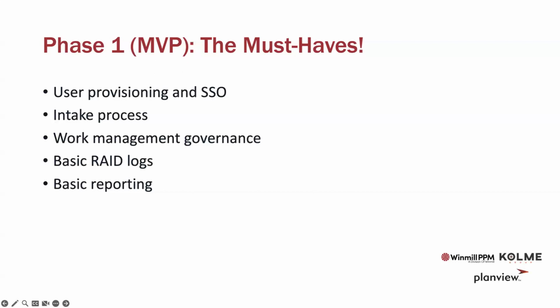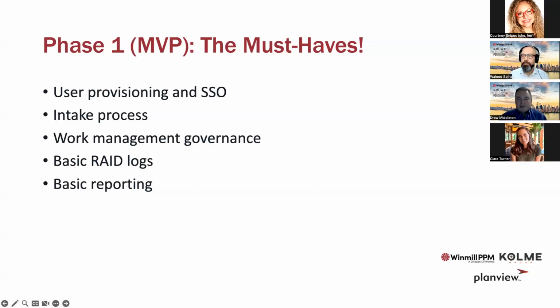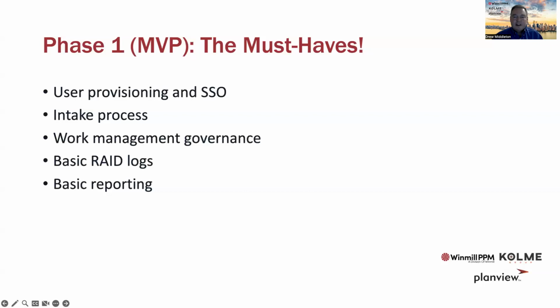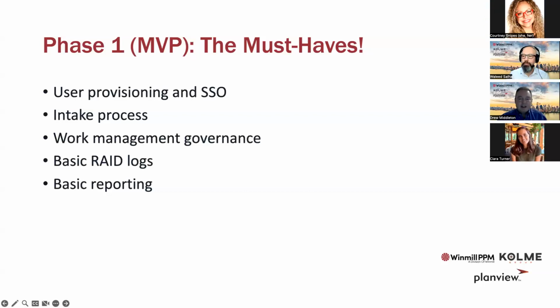As you know, in your work breakdown structure, it's a project. It's got a beginning, a middle, and an end. All projects have to end. Well, maybe you need some governance around the ending of a project. Maybe there are things that have to be done before a project truly can be closed. Or maybe there are things in the middle, a life cycle projects might go through in IT, for instance. They could go through a very standard life cycle, if we do requirements and then design, then we build, we test, we train, we deploy. Very straightforward. But sometimes people have a little different take on things. If we put some governance on our work management process, then we can probably help folks adhere to that, and we have some standardization. That's going to make it easier when we're trying to do that enterprise level reporting.